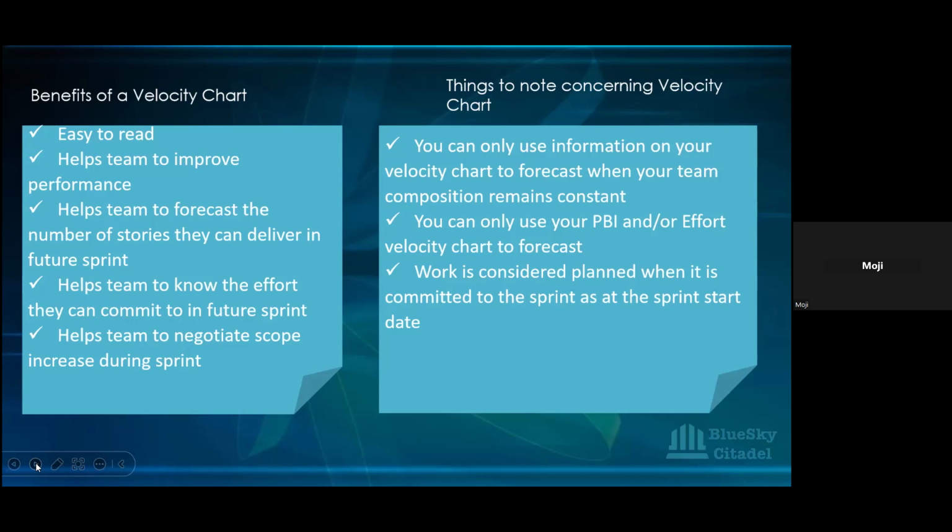So you can use your metric. If you don't have a velocity chart guiding you on your average velocity, there's every possibility that the PO will bring it, say it's important, and you take it with everything else in the sprint, and then deliver it at the detriment of other things you planned at the start of the sprint.